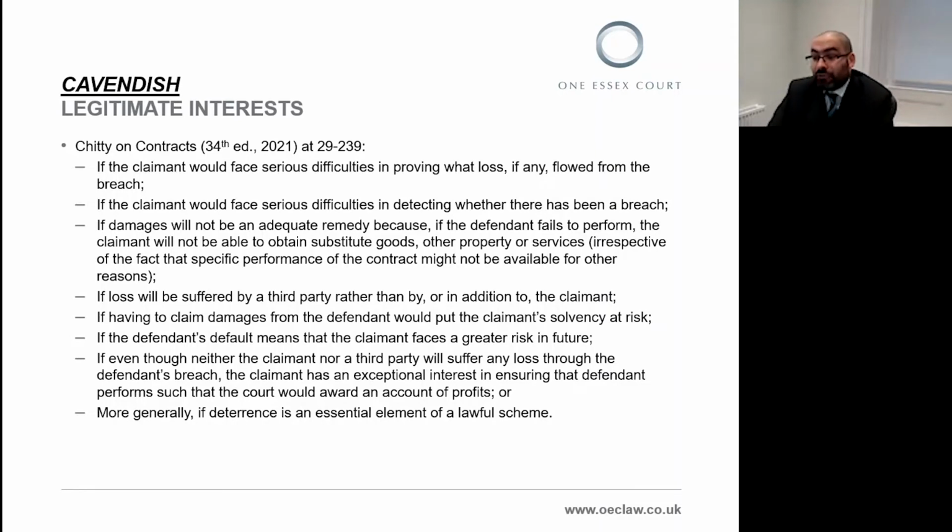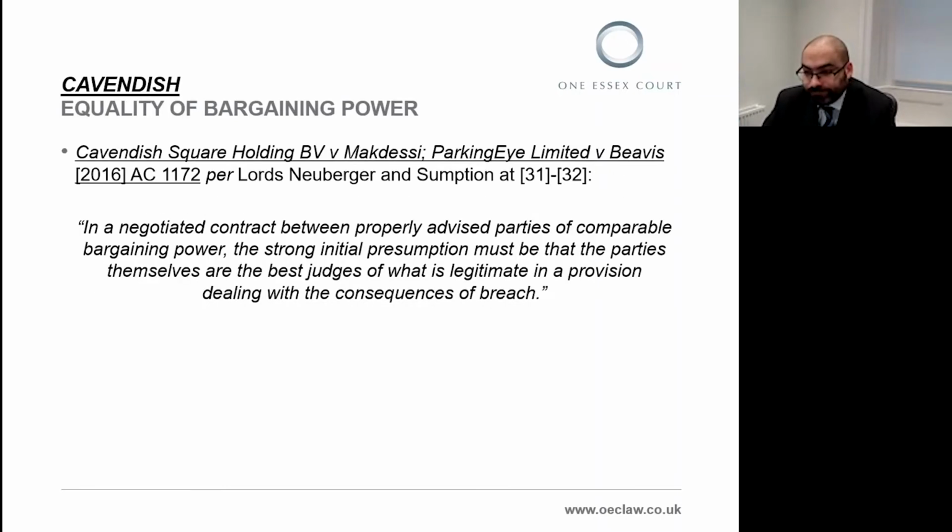And more generally, deterrence can be an essential element of a lawful scheme. And these are just examples, and there may well be many more legitimate interests justifying the inclusion of a clause. Suffice it to say, for now, and I will come back to this, that in drafting a liquidated damages clause, it is imperative to think about which of your client's interests that clause is intended to protect, whether that interest is legitimate, and whether the remedy set out is in proportion to protecting that interest.